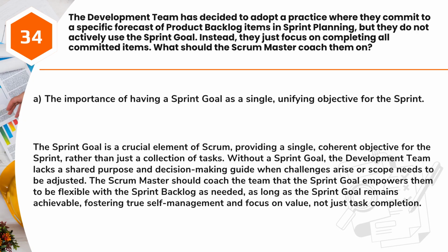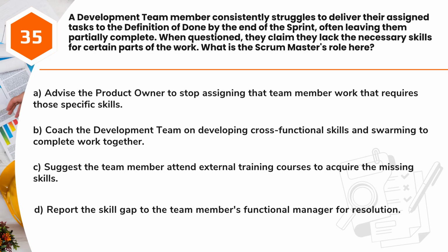The Scrum Master should coach the team that the sprint goal empowers them to be flexible with the sprint backlog as needed, as long as the sprint goal remains achievable, fostering true self-management and focus on value, not just task completion. Question 35. A development team member consistently struggles to deliver their assigned tasks to the definition of done by